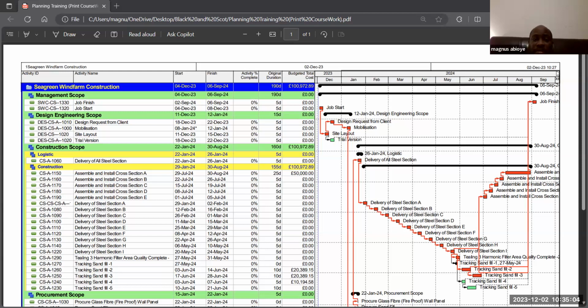The downside of dissolve is that once you remove it, you can't bring it back. It's gone. But delete an activity, you want to delete B and it has A and C. When you delete B, A and C will still be hanging there without a predecessor and successor.